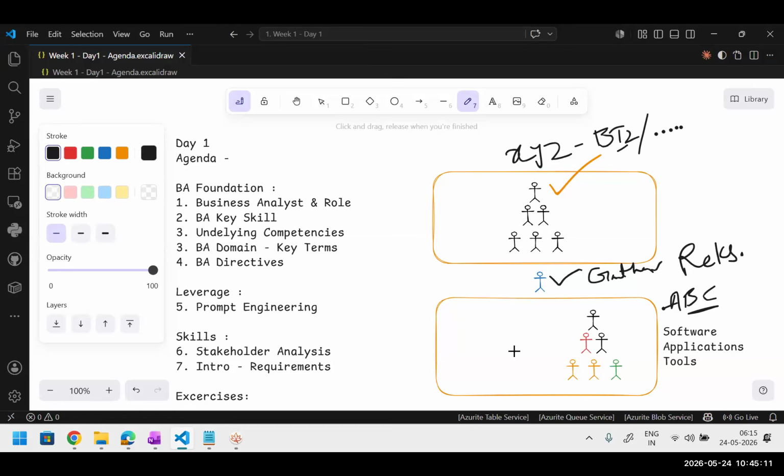It's uncertainties and risks. Because when you are gathering requirements, if one requirement is misunderstood, after 6 months it becomes costly. Maybe everybody is happy with the documentation and everything, but when the developers implement it and users start using it after launch, they realize it is not useful, because the requirements were not properly clarified.